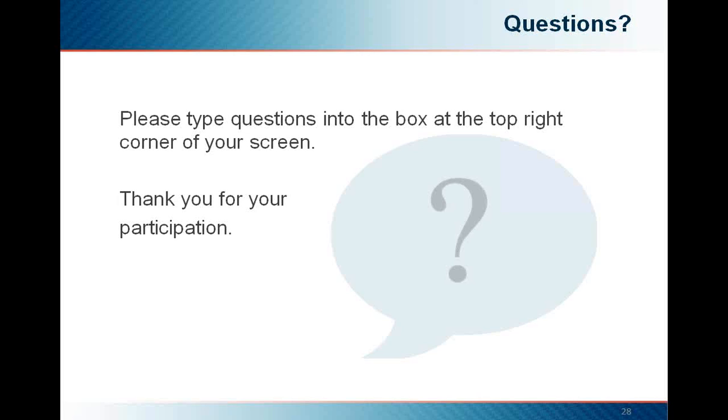So as you're developing a database piece, for example, or a particular interface, and you find that that's a very high-risk piece, hit that first in your first iteration. You may discover a problem there that you solve. It might take you a little longer initially, but that might help you complete it later on. So we've had experience in that, and I do believe that it works pretty well that way.